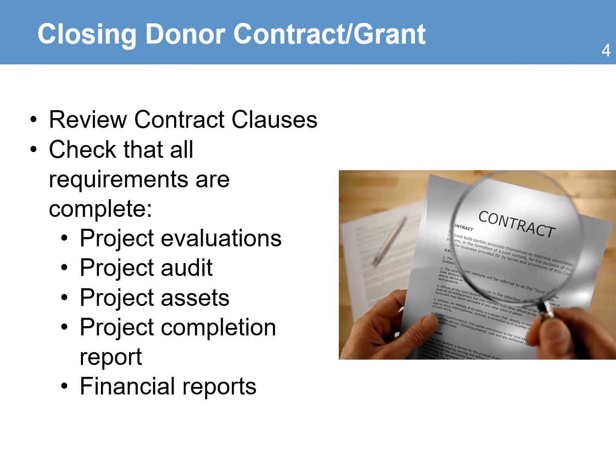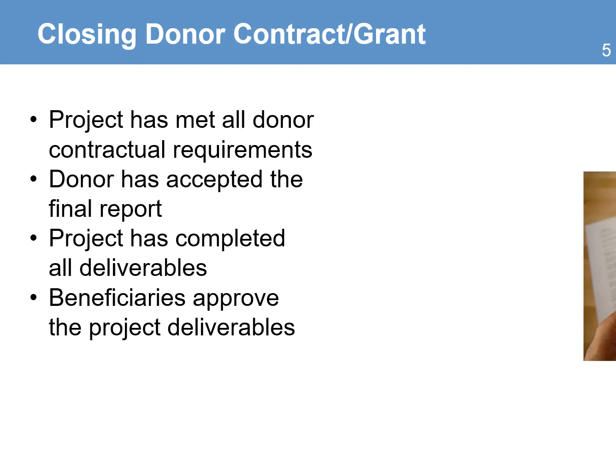Closing the donor contract or grant is the most important step. Here you need to review the contract clauses to make sure that you are not missing anything important. You check that all contract requirements are complete. This may include evaluations, audits, list of assets purchased with donor funds, the project completion report, and final reports from finance with information on balances.